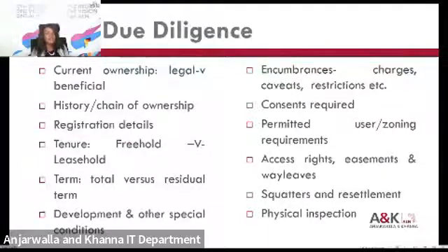When it comes to licenses, I think they are less preferred because licenses do not technically grant exclusive possession of the land, and licenses are revocable and are not in general transferable. So you'd only take a license if there was a statutory restriction or other prohibition that prevented you from taking a more secure document, such as a lease.